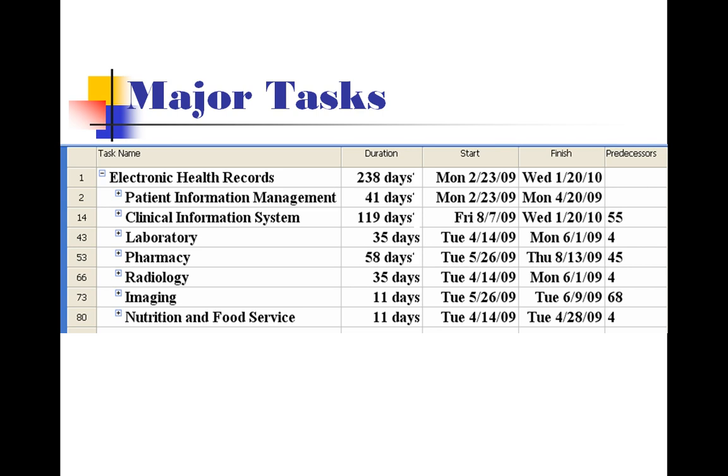In this implementation, certain tasks must be completed in order for others to begin. This plan takes account of each task's predecessors and automatically assigns the logical start and end times. In some of these activities, configuration is followed by training. Training cannot start earlier than the day following the completion of configuration. However, the next activity can start as soon as the previous activity's configuration is completed, with no need to wait for the activity's training to be completed.